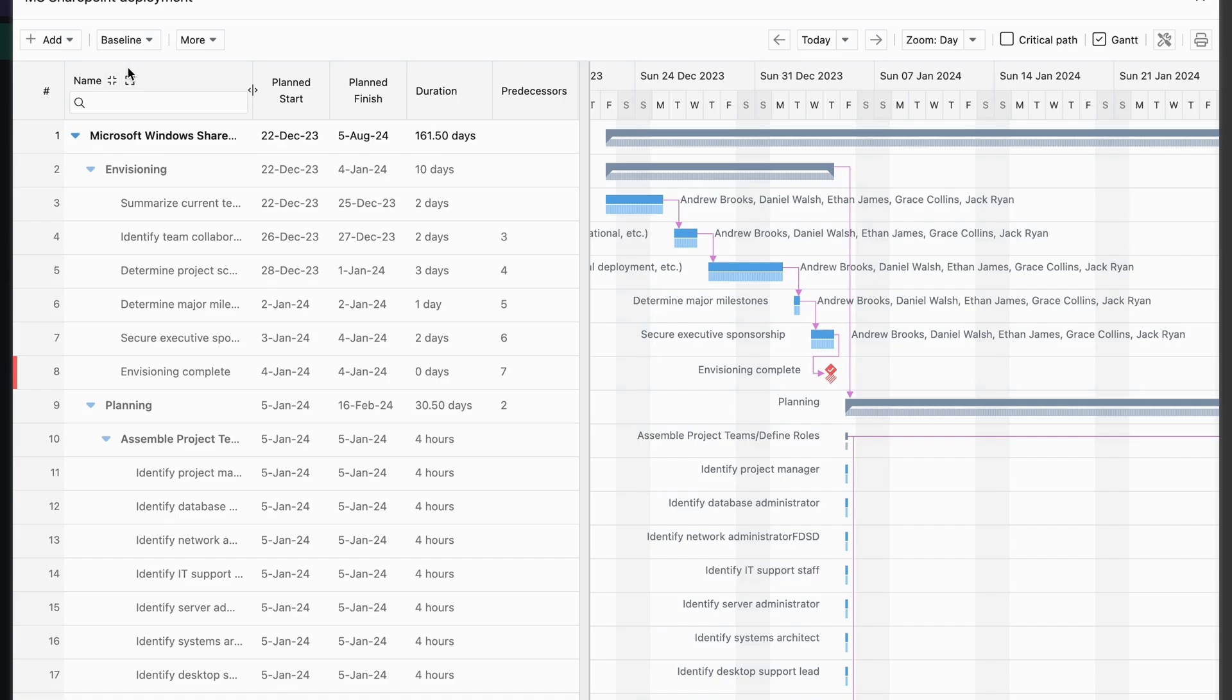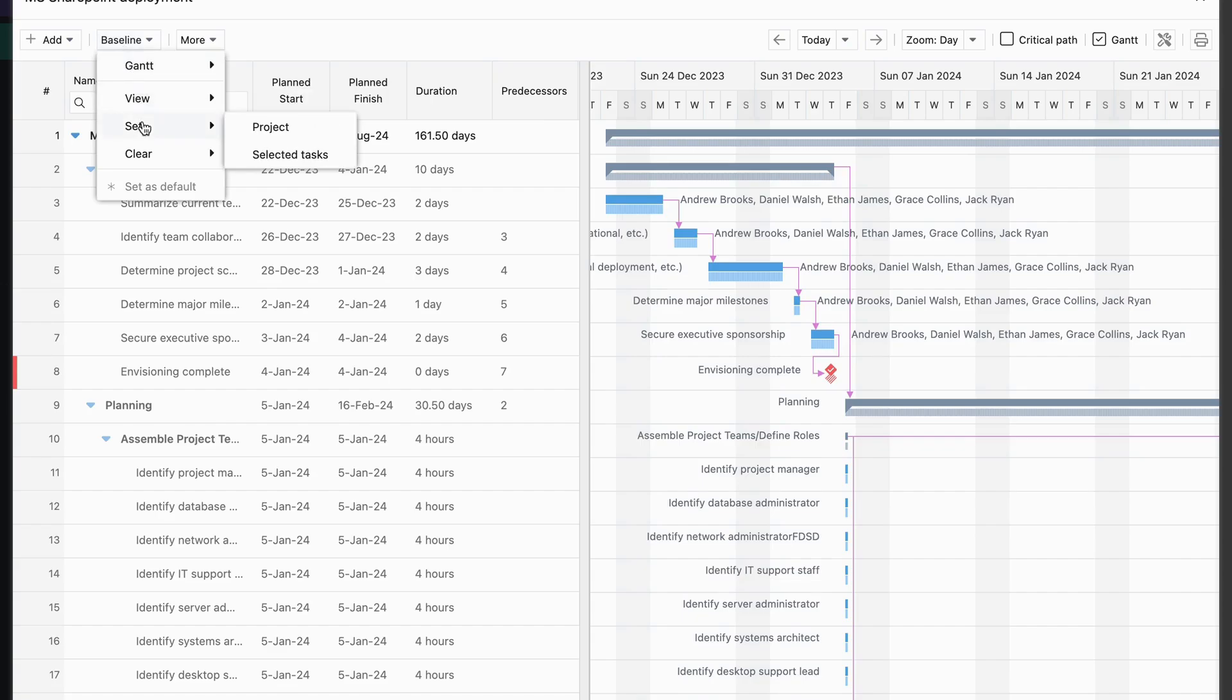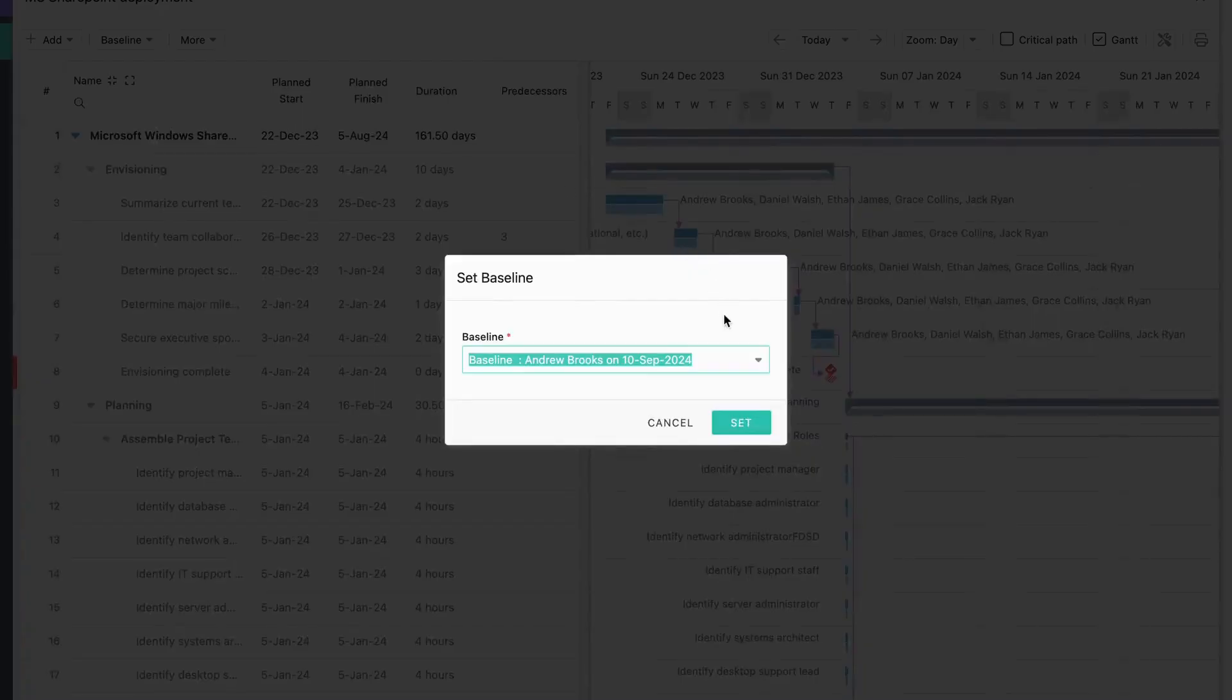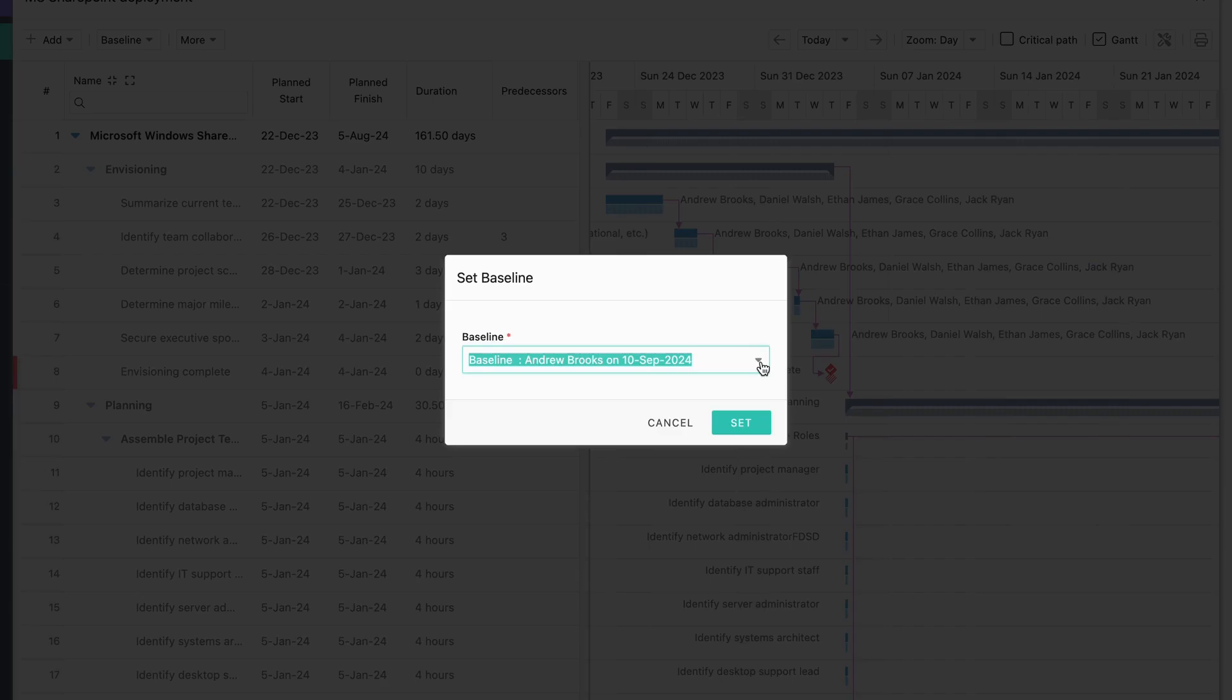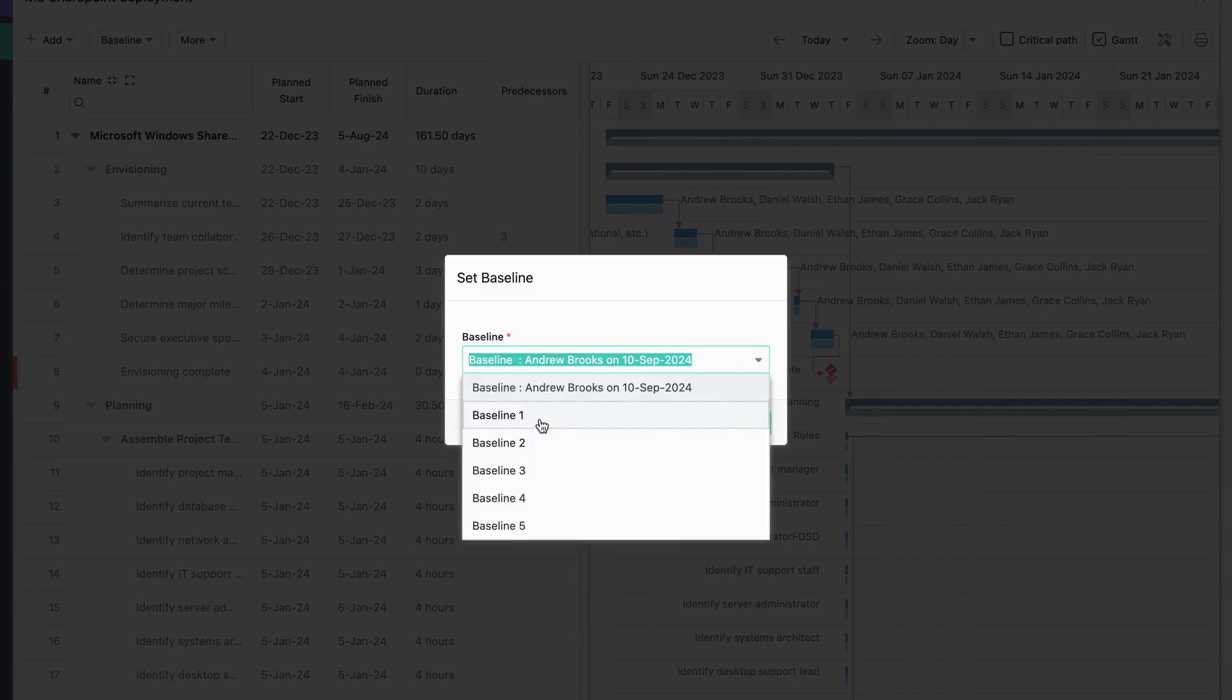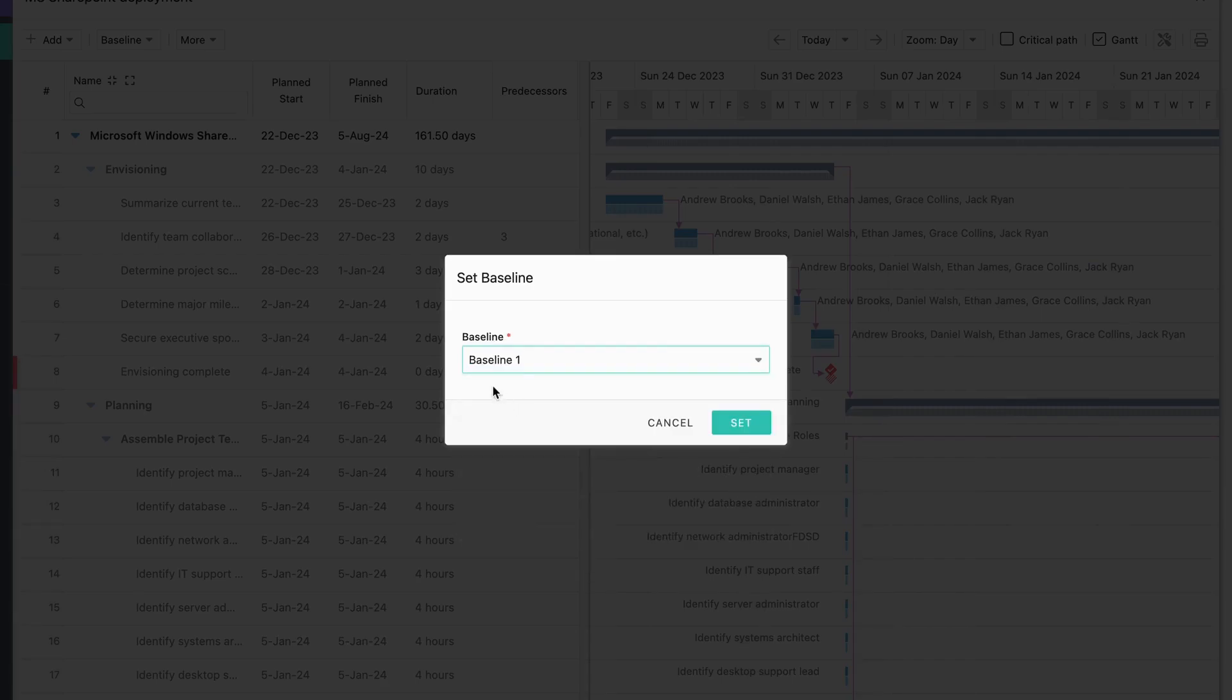If your project plan changes and you need to add a new baseline, simply follow the same steps. Click on Baseline, then Set. This time, select a new baseline slot from the dropdown before saving.